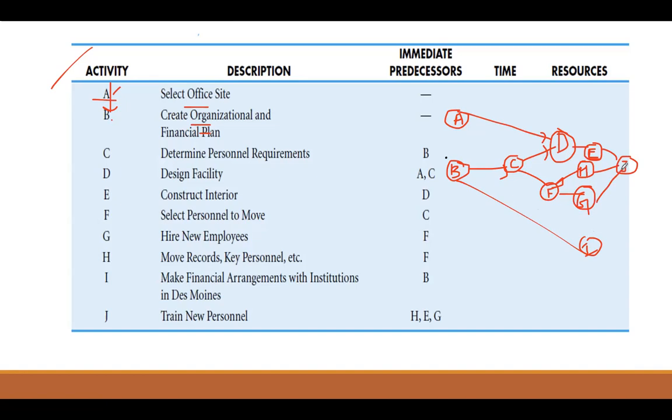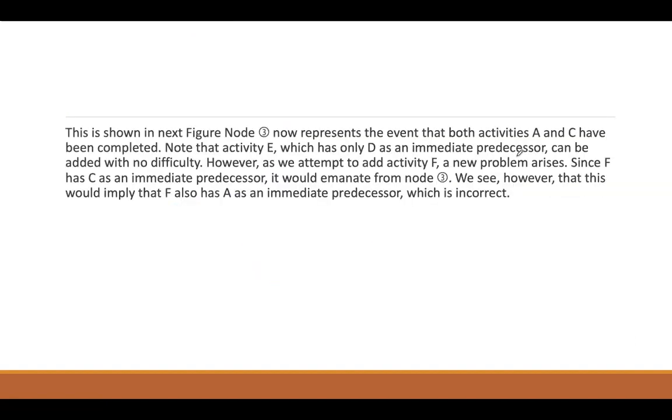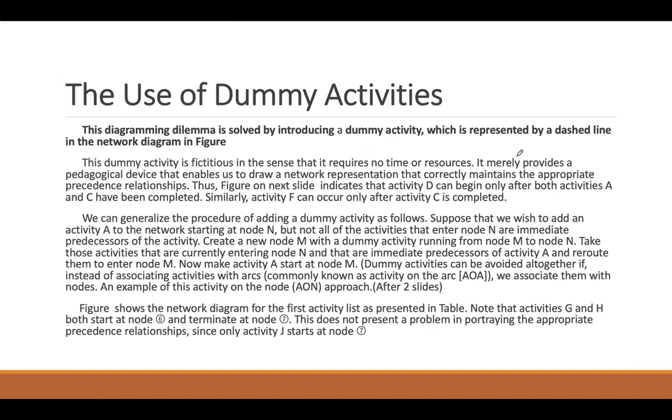You can do one thing to make your diagram clearer. You can write a start node here. It can be a starting node, after which the activities start, and you can have an end node to show the end of the project, where both ending activities enter. You can write finish or end node. So J and I you can enter here. So this is your network diagram. Okay. So in the class we learned the concept of dummy as well, right?